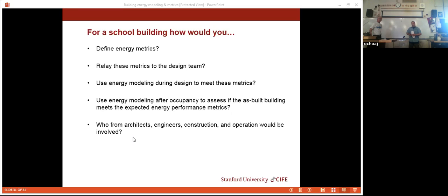And your integrated concurrent engineering team, who are you going to invite to that meeting? From our as-is to our final, after we do our manipulations to improve it, we will have the stakeholders that have input, like the installers, our solar panel installers, so we can discuss which takeovers are going to take place in improvements. And if we're going to do that, who's going to go first, so we're not in each other's way, and so we can coordinate, because everybody's in the same place making the same move. Okay. Architects, engineers, operations. Very good.